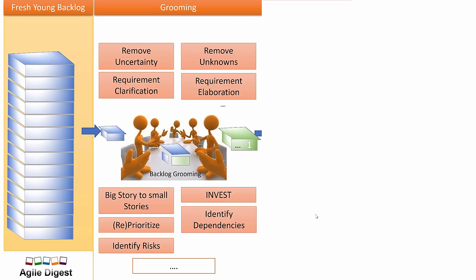If a story is very big, they break it into smaller stories and then re-groom and re-estimate those smaller stories. We also talk about INVEST — the acronym for Independent, Negotiable, Valuable, Estimable, Small, and Testable. We look into INVEST and also do prioritization based upon dependencies, risk, or cross-functional involvement. Keeping everything in mind, we re-prioritize and mark the stories as groomed or move them to low-priority.